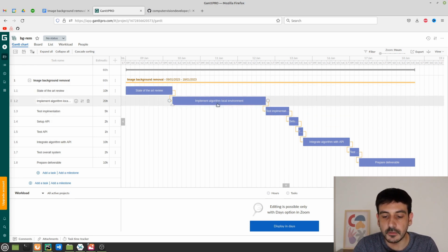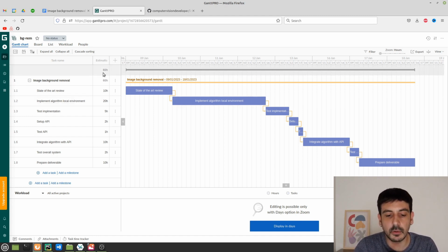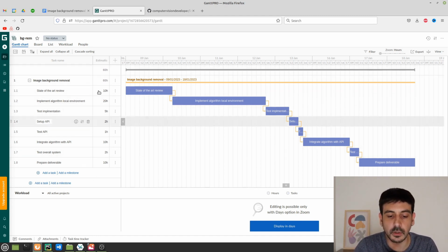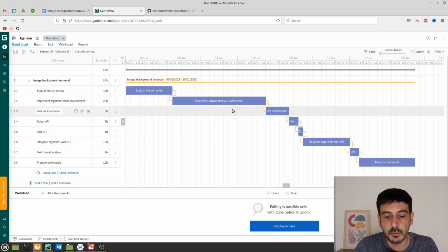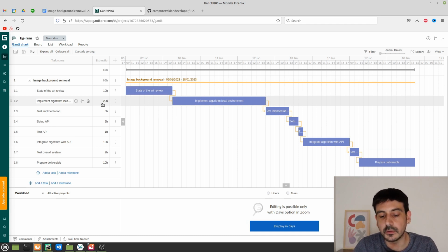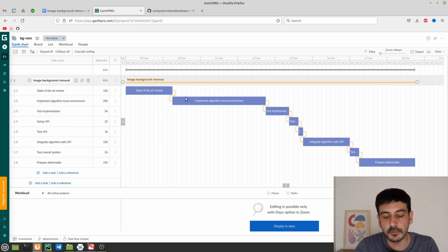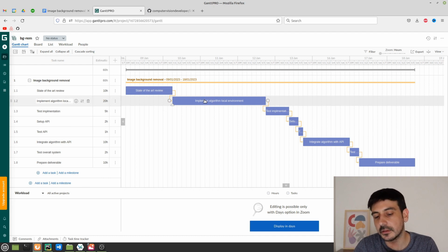So this is where we have the risk in this project, and you can see that I have estimated 20 hours, and this is where I think we will use the remaining 20 hours, the buffer of 20 hours that we are not using and not seeing in this project. If something happens, this is where we will need to use this buffer. And I think that 20 hours, and using maybe 20 hours more, 40 hours in total, should be more than enough to complete this part of the process. But let's just hope that my assumption is correct and we don't really need to work as many hours, or take risks in this part.